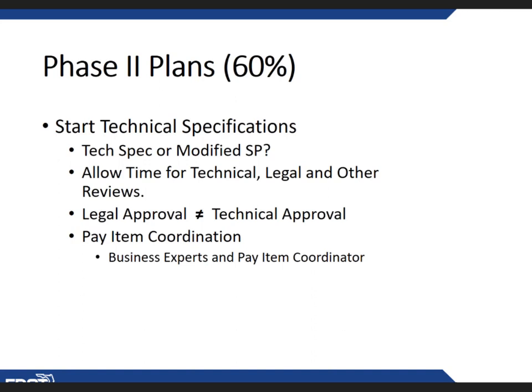So that's why the manuals say load your pay items at 60%, because that is when you should be identifying the need and work with us then.